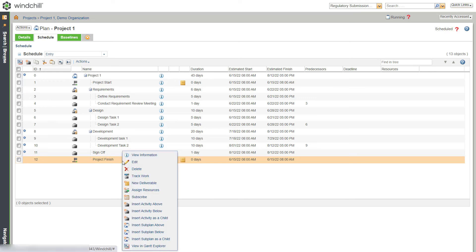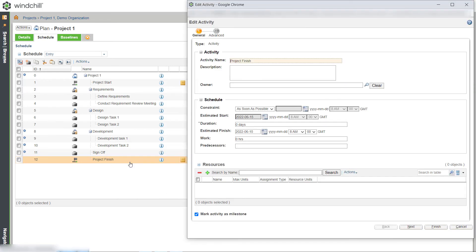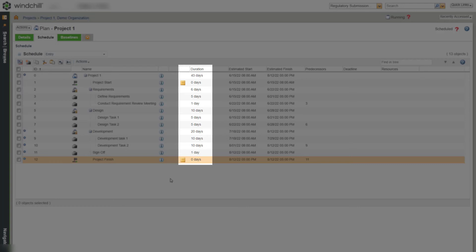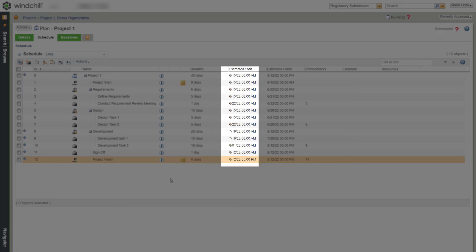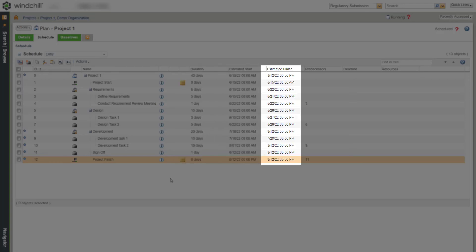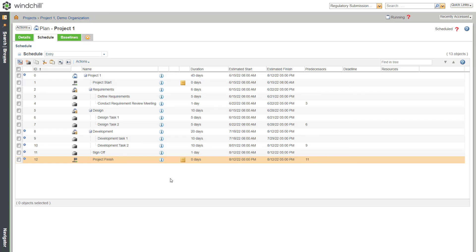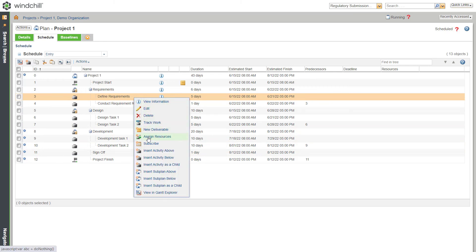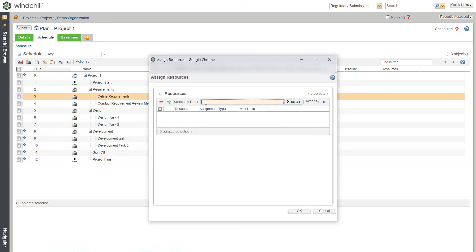Now let's provide the predecessor for the Project Finish activity. We have created all the activities and child activities. Here you can view the duration, estimated start date, estimated finish date and predecessors for each activity. Now assign these activities to a specific user. Right-click the activity, select the Assign Resources option and click OK.